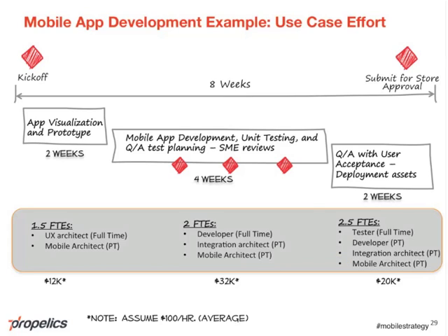So we talked a little bit about, based on what region you're in, what consulting contracts you have in place. You've got a lot of corporate agreements. What I did, just to keep the math simple, was assume $100 average per hour. These roles can go $80 to $150 based on experience.